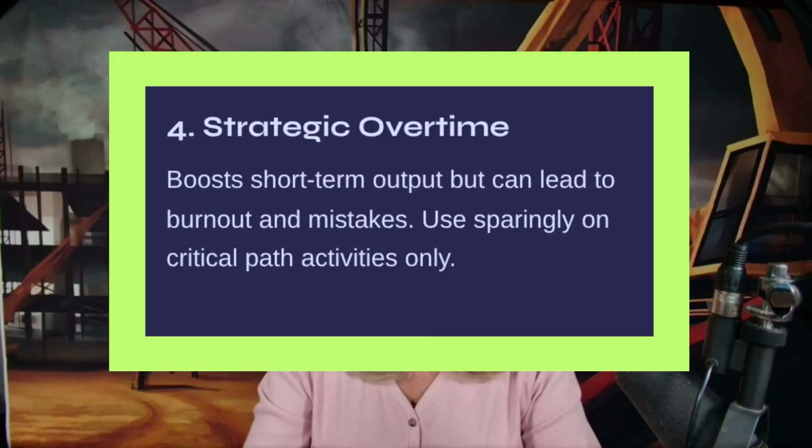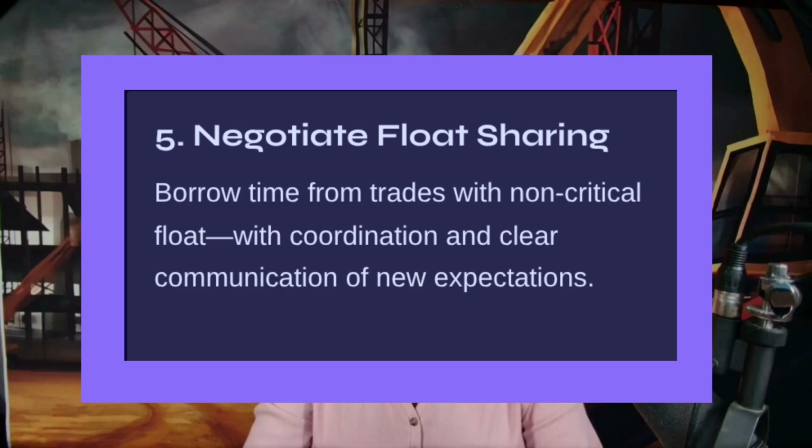Work overtime strategically. This one's tricky. It boosts short-term output, but can lead to burnout, mistakes, and cost overruns. Use it sparingly and only on activities that directly impact the critical path. Negotiate float sharing. If another trade has non-critical float, you can temporarily borrow time from their schedule with coordination and agreement. Just make sure you communicate the new expectations clearly.